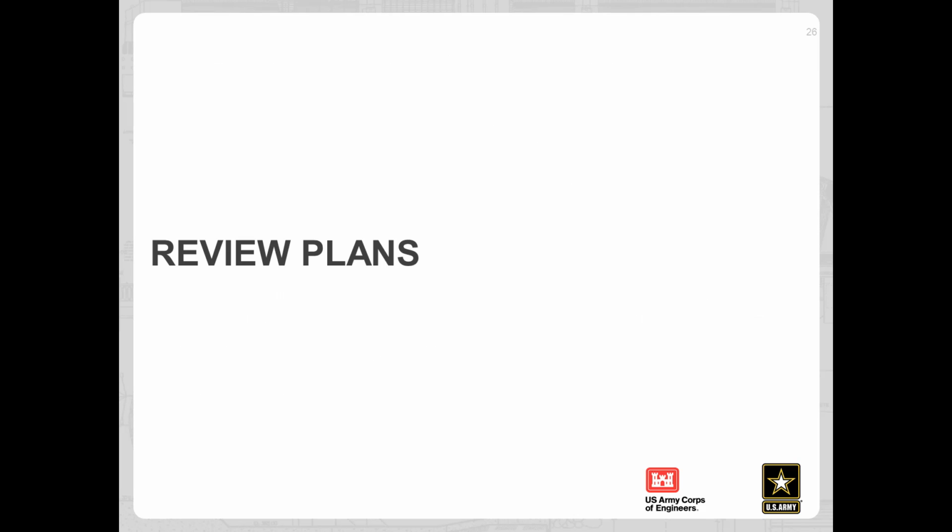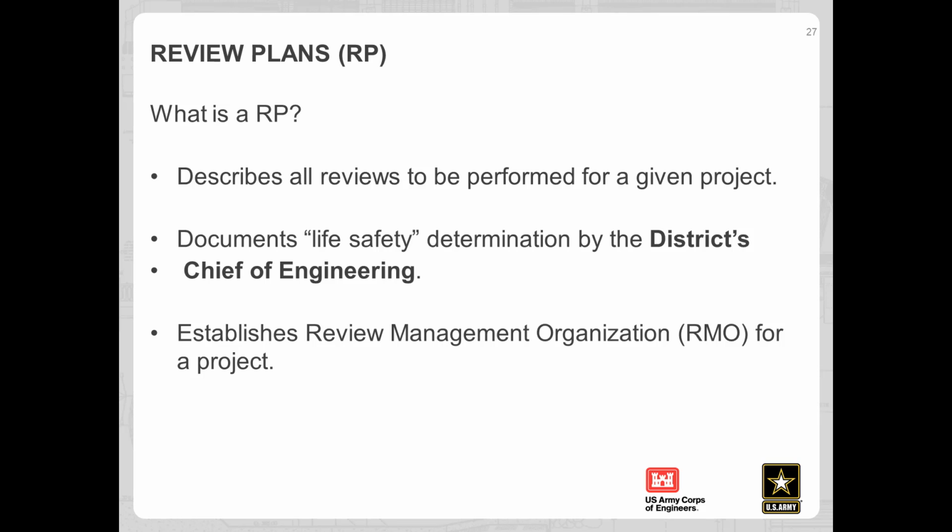Okay, most everybody knows what a review plan is, but I don't know that districts always think about it this way: it's the scope of work you're agreeing to with your review management organization. So it describes all the reviews that would be performed. A key factor is that, if you've got say a flood risk management project, you want to have a determination by the district chief of engineering on whether or not there's a significant threat to life safety, but it does establish who that review management organization is for your project. So it's a very important document for working hand in hand with your review management organization.